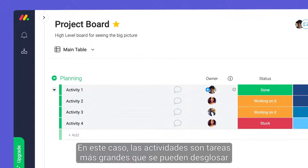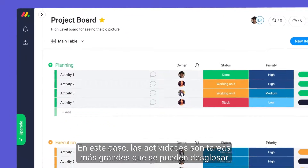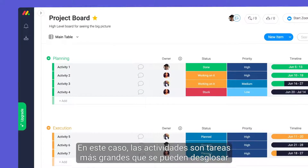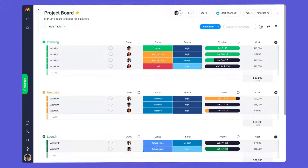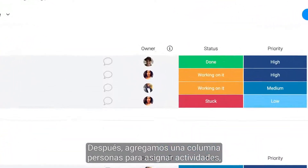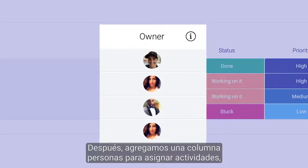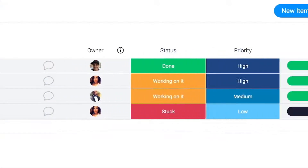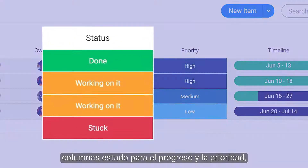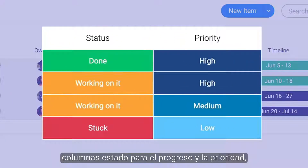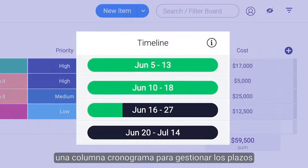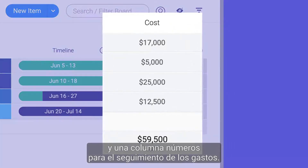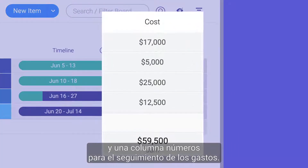In this case, activities are larger tasks that can be broken down into smaller tasks on our low-level board. More on this later. From there, we've added a people column for assigning activities, status columns for progress and priority, a timeline column to manage deadlines, and a numbers column for tracking expenses.